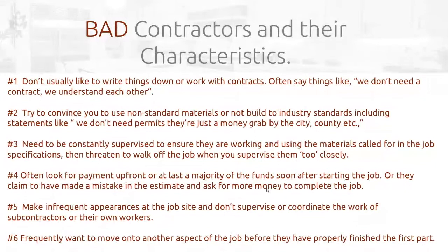As you know, if you don't get the permits done from the beginning, it can delay the project 6 months, 7 months, sometimes even a year. So this is extremely important on number 2: make sure the general contractor has those relationships in City Hall to get the permits done.